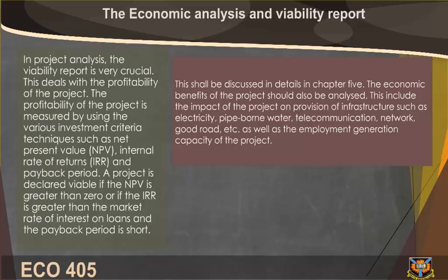The economic analysis and viability report. In project analysis, the viability report is very crucial. This deals with the profitability of the project. The profitability of the project is measured by using various investment criteria techniques such as net present value, NPV, internal rate of return, IRR, and payback period. A project is declared viable if the NPV is greater than 0, or if the IRR is greater than the market rate of interest on loans, and the payback period is short. This shall be discussed in detail in Chapter 5.